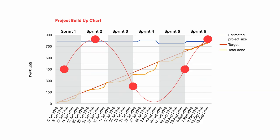Internally, this press page section was kind of promised and sold: this is going to be great, we're going to have this in our site. But when it got down to, we're going to run out of time, can we launch without this? What came to the forefront of everyone's understanding was that this press page didn't exist yet. So nobody was going there or expecting it to be there. It was just a new thing that had been promised. So now we have to say this is getting pushed off because it won't fit. There were enough things like that.